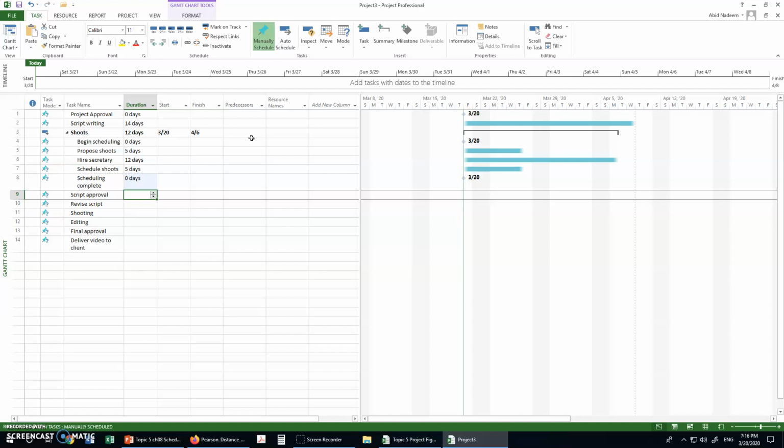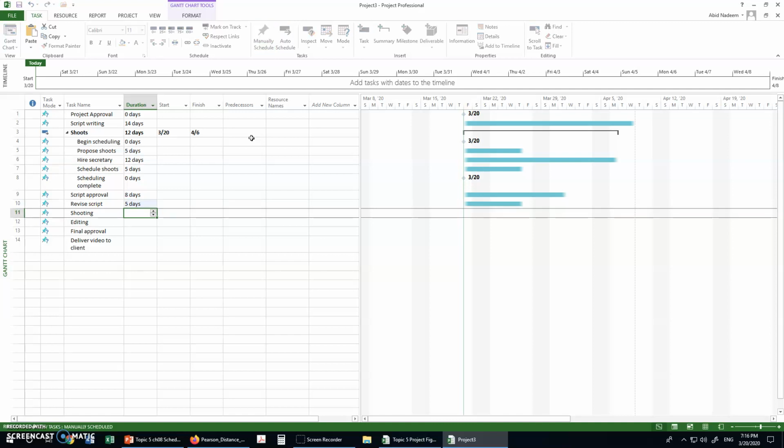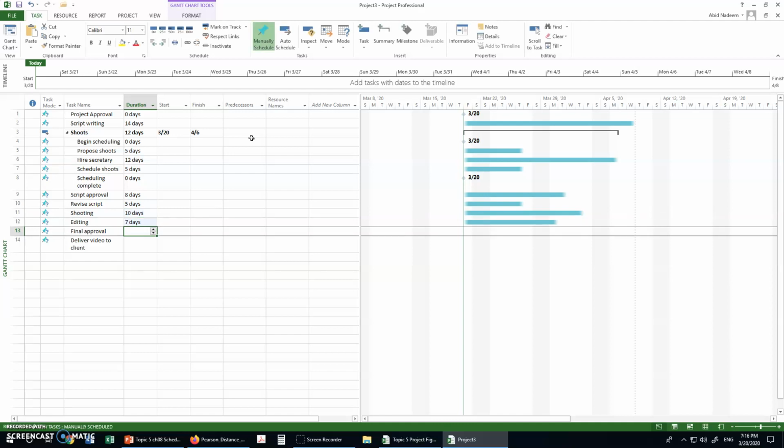Then script approval 8 days, revise script 5 days, shooting 10 days, editing 7 days, final approval 2 days, and then deliver video to the client 0 days. This is the finish milestone.